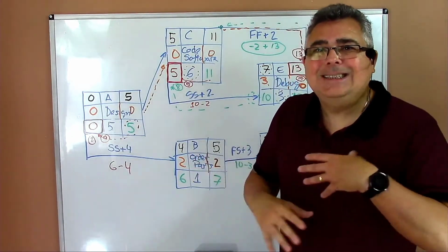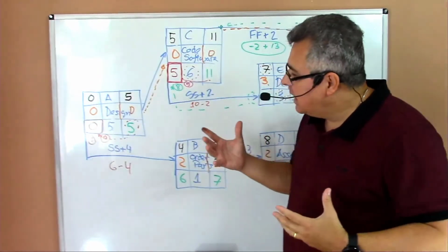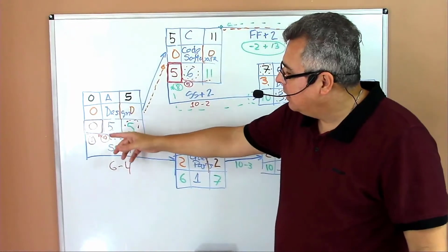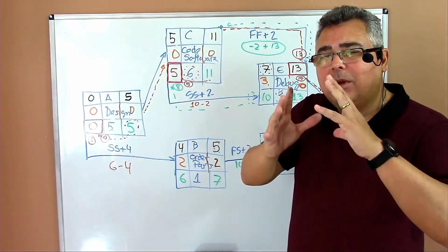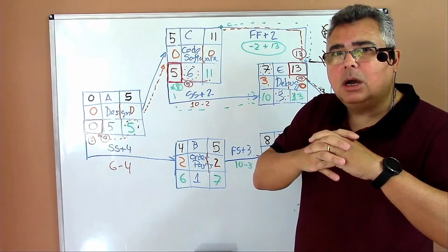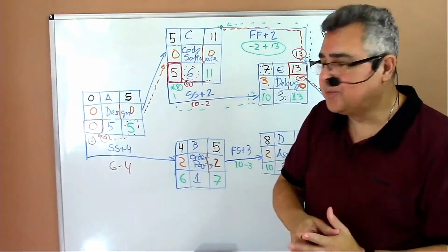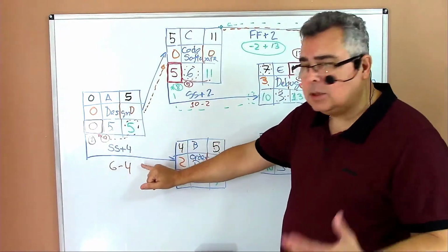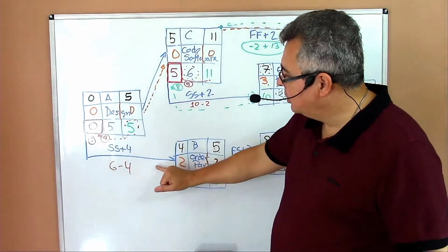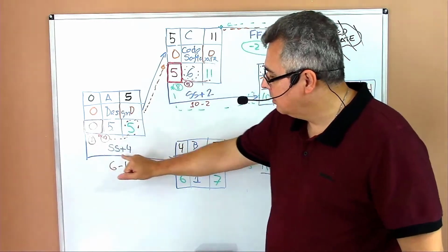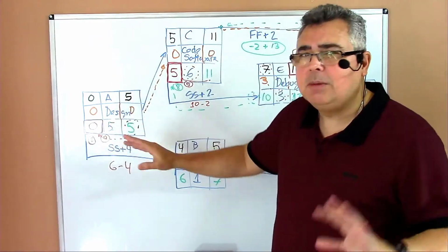What the project manager, discussing with the project team, may have found out is that actually I don't have to wait for the whole design. Maybe I have to wait some days until they have an initial draft, and after that they will be issuing a list of materials. And therefore, when they issue the list of materials, I don't have to wait for them to finalize the design. So I can push that back and have them start the order part right after the list of materials, which should be done by day 3 or day 4.